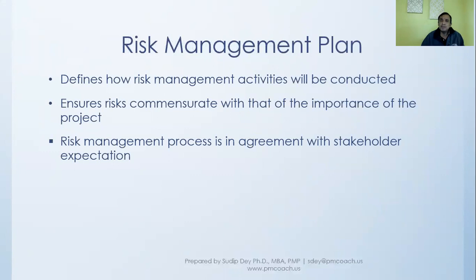Now, this risk management plan, we will go through this process at predefined stages in the project, depending on how large the project is. Sometimes maybe it's once if it is small, but if it's a larger project, at predefined points we'll look through the risk management, review it, update it, and so on.